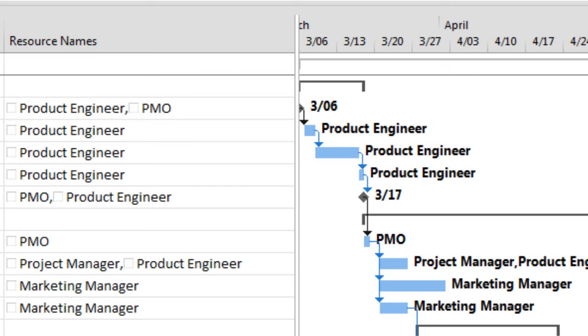In this scenario, the project manager will use Microsoft Project to help him or her find available team members to perform the required activities. Given that this is a matrix organization, the project manager will collaborate with the organization's resource managers when seeking to commit resources to their project or projects. The resource managers are essentially the gatekeepers for those teams, ensuring that their respective team members are allocated accordingly. That is, ensuring that their team members are optimally assigned to meet the organization's objectives.